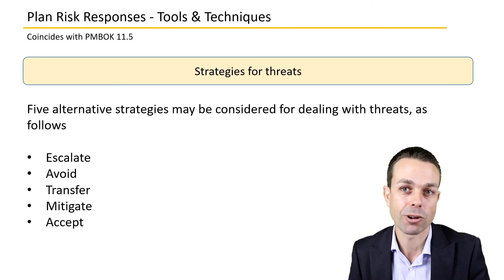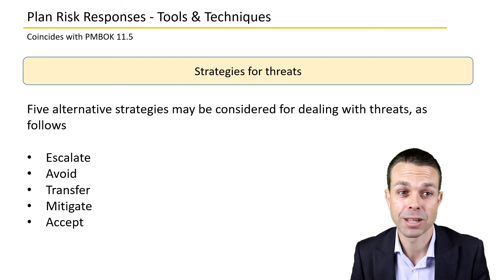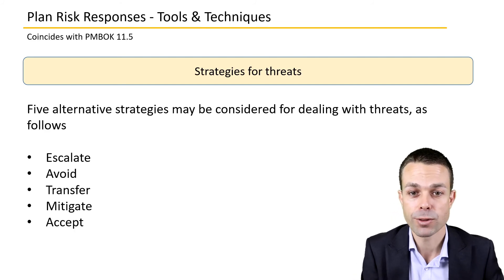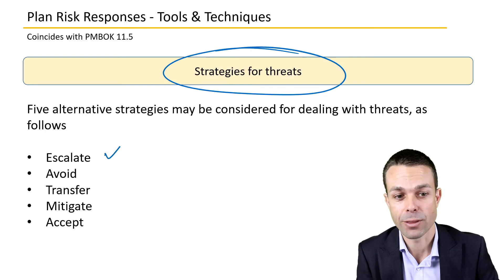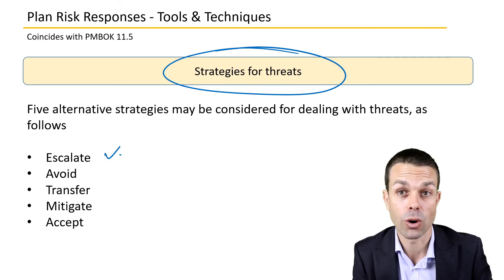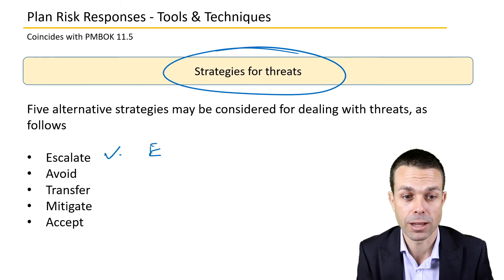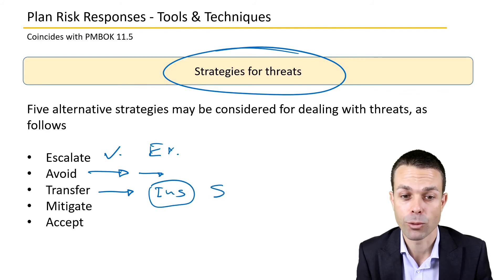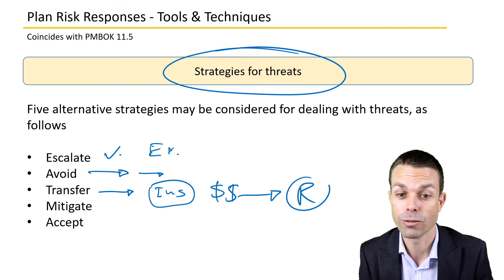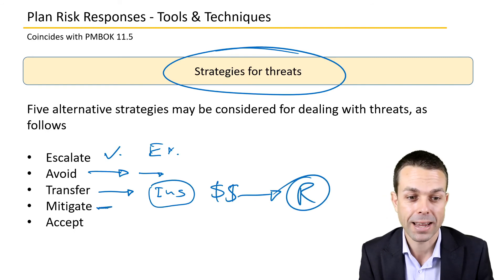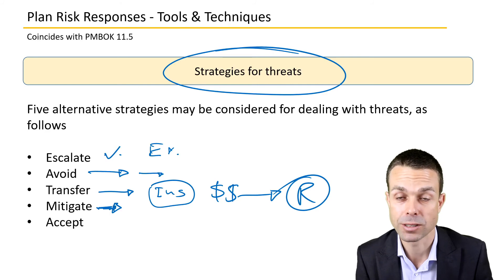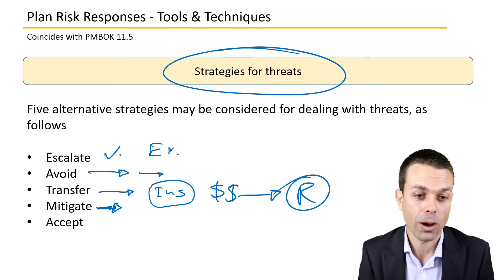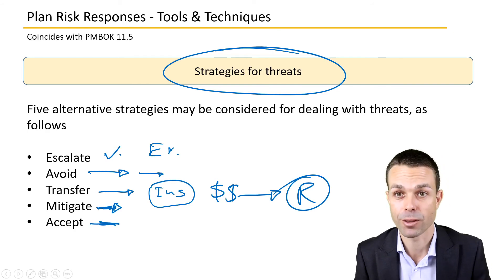There are strategies for threats that you'll see in the key concepts for risk management. Strategies for threats include: escalating to an authority beyond the project such as an executive level; avoiding it or waiting for another time; transferring it to another party — usually through insurance, where you pay for a policy and they take on all the risk; mitigating it by taking steps to reduce the risk through your own processes or people; or simply accepting it if the risk is small enough.